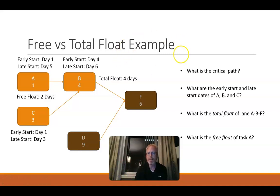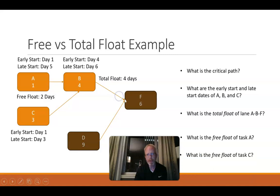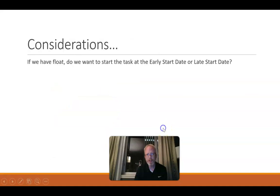So the free float of task A is two days. We can think of it like a mini critical path of just this subset: C to B would be the critical path if we ignore D to F. Free float is effectively the float on the parallel path, which is two days. And the free float of C is zero — C cannot be delayed at all without impacting the early start date of B. That is essentially free float.